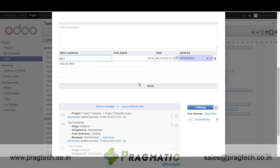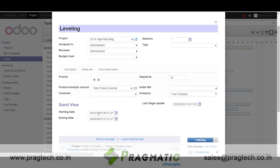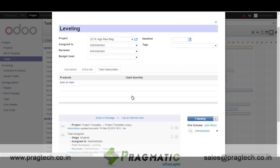That covers the details on the task. We also capture the starting and end date based on actuals, and we have an endpoint report with a variance showing actuals versus estimated values. Additionally, task deliverables can be captured here — for stage-wise deliveries, any deliverable attached to a task or group of tasks is recorded in this section.